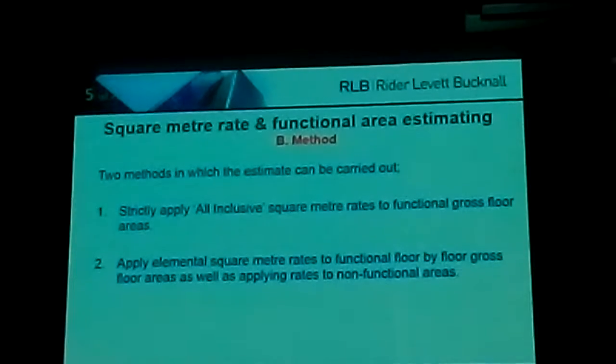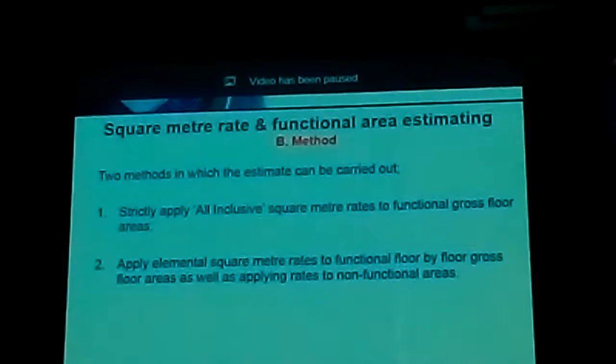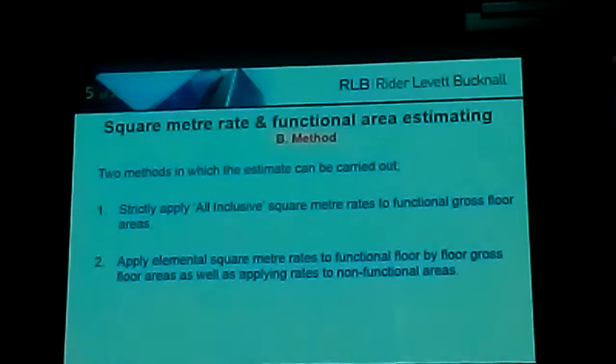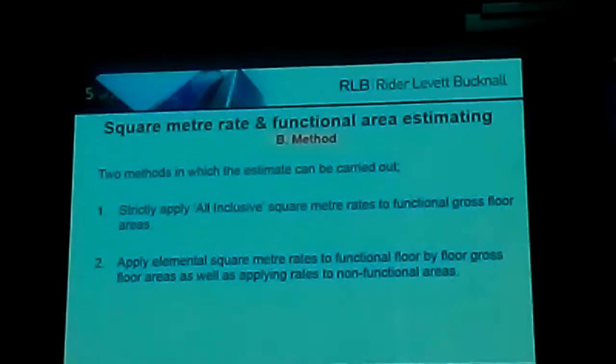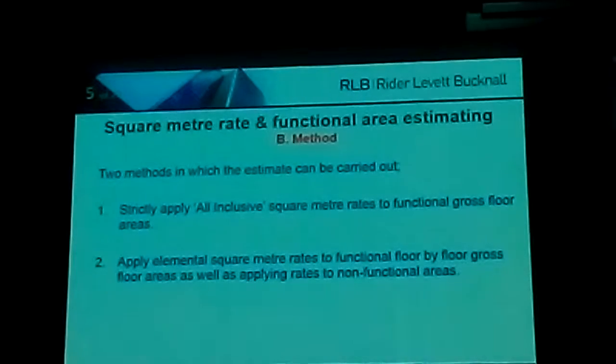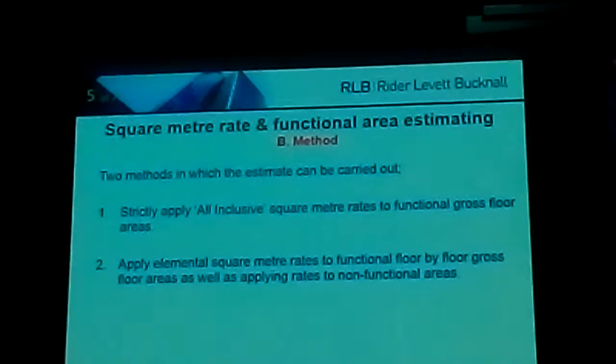In Melbourne, we tend to shy away or avoid method 1. We prefer to apply method 2 to provide more accuracy in our estimates, as well as show a point of difference from our competitors. Method 2 also allows us to provide clients a basis of how we have come to the overall estimated figure, as we can extract key rates from the basic typical floor build-up, such as the facade.